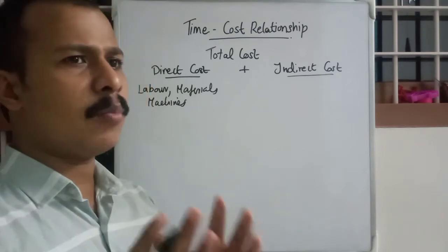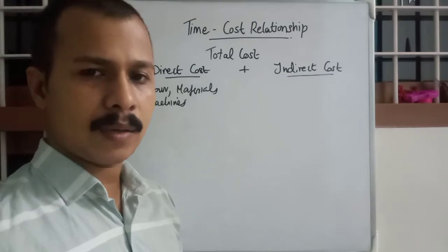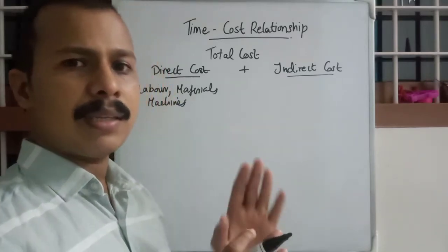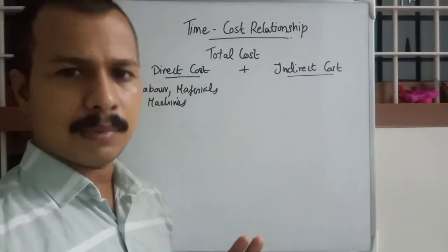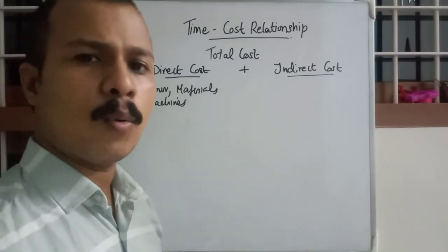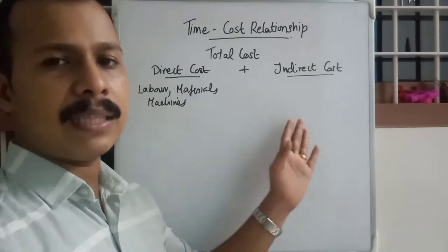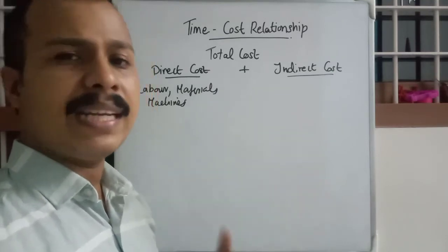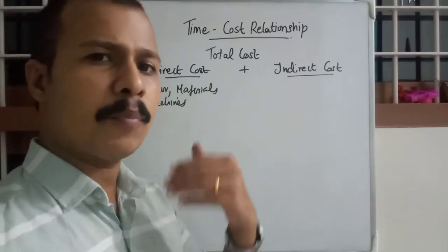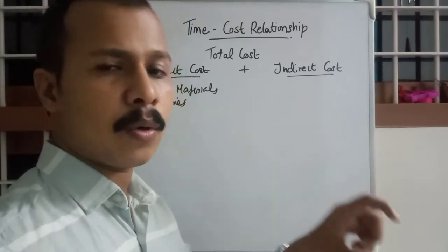Okay, the value of those things will not be coming into the building or whatever the product that we are manufacturing by the organization in the project, but these costs are inevitable for any project. You have to set up an office and you have to pay an accountant for this. An accountant will not be contributing significantly to the project, but we need an accountant, right? We need a security. We will be incurring depreciation. We have to pay rent for whatever months we are staying or whatever things we are storing in the storeroom.